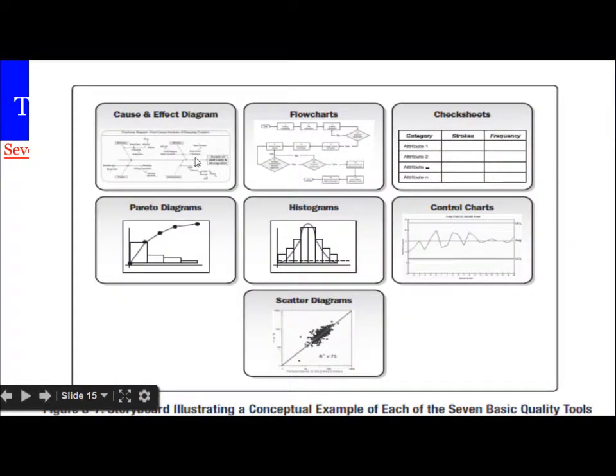This is the diagram. This is a cause and effect diagram, which is also called fishbone or Ishikawa diagram. Here we put the problem and then for every factor like machine, people, environment, etc., we ask why, depending on the factors involved, to get the root cause.